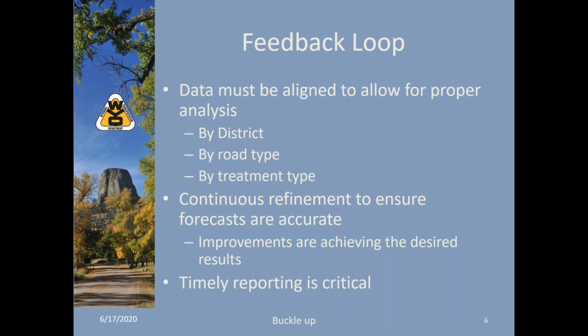We have to support by district, the classification of the road. For example, there were several years we were doing well statewide, but our analysis showed that some districts were putting too much work into improvements and not preservation. And other districts were actually putting in more preservation and helping the lower performing districts.